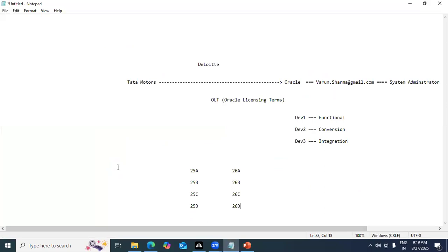See, these are all development and production, right? It depends. You can purchase multiple development instances from Oracle. How many you want depends upon you. It depends upon the complexity of the project. If your project is highly complex, with many integrations and many conversions required, it's better to go with 3 development instances, which generally the Big Four follow as a cycle. But there is no fixed rule.